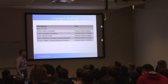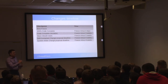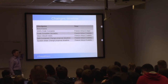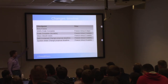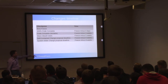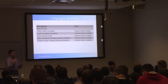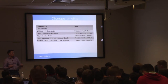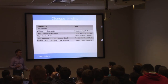You want to have deadlines for when things happen. Basically, everything is pinned off of the beta freeze — when we freeze the code getting ready to release the beta. So we have code complete, testable code complete, and a mass rebuild. We have a deadline several weeks prior because we want the change to get announced fairly early. In fact, sometimes people submit changes for a future release before the current release is even out, because they want to get it in as early as possible.